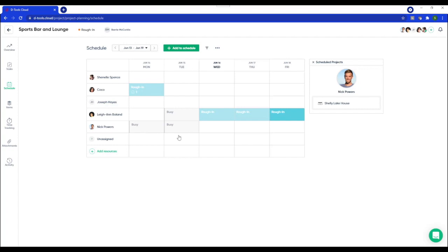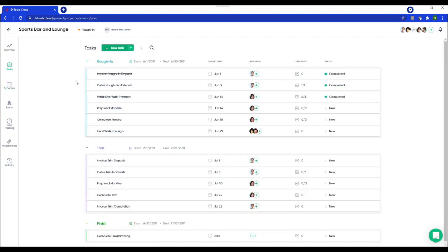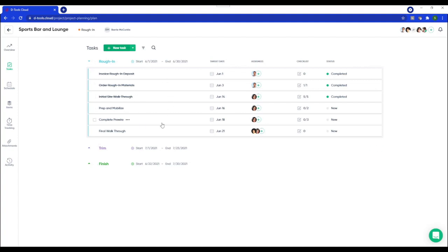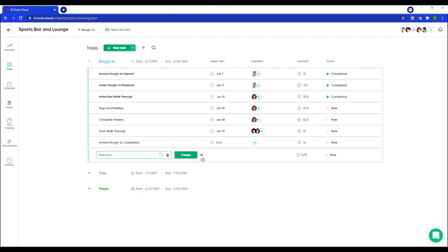Okay. So the second workflow, which is more my style, is to start by creating tasks that define my project plan. And you create task groups. For example, I've grouped my tasks by phase. I have rough in, trim and finish, but you can group tasks however you want. So just simply edit the name and then you'll add a task to your project plan. Let's say we'll invoice rough in completion and add that task.